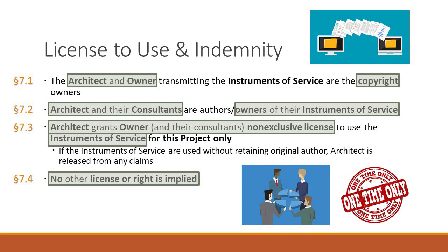And then the second part says, the license granted in this section permits the owner to authorize the contractor, subs, etc., as well as the owner's consultants, so that kitchen designer and separate contractors, to reproduce these instruments of service. You can make copies, guys. Even though it would be copyright infringement, I'm giving you the authorization of this license to make copies of extra sets of drawings and specifications solely and exclusively for the performance of services or construction of the project. Again, it has to be tied to the specific project.